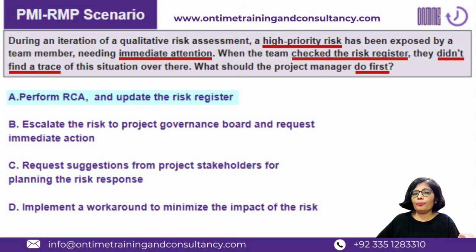This will waste time. I'm not saying RCA is a waste of time. I'm saying that this is probably a crisis situation, and you need to come up with an urgent response plan, urgent action, to at least minimize its impact, which is option D. Option D is actually the correct answer to this question, at least in this situation. The first step is option D, followed by RCA. I hope you understand the situation.